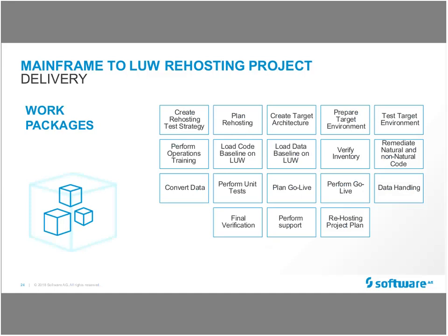And regardless of who does it, these are all the steps that go through with this. And I want to talk about one in particular. Here is the perform unit test. We can do that. You can do that. But the one thing that is going to be solely your responsibility is the application level testing.